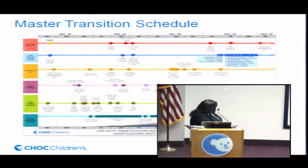And this is the wave of our hiring. So you can see over here in July, August, we had very few people here. We had very few people to do all that work. We had the directors here, but they had to hire. They had to think about competencies and training while they were trying to choose the right equipment, et cetera. So certainly something to think about. I would like to see a tsunami this way. If I did it again, I'd want to do that. But I know budget sort of curtails us of that. So that's the wave of hiring for us.